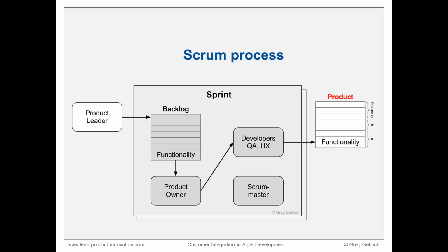Another key player is the Scrum Master, who acts as a mini project manager to keep the Scrum cycles on time. They work with the team to break down one or more pieces of functionality from the product backlog into developer tasks that will be completed in the next development cycle. In Scrum, these developers' tasks are stored in a queue called the sprint backlog.